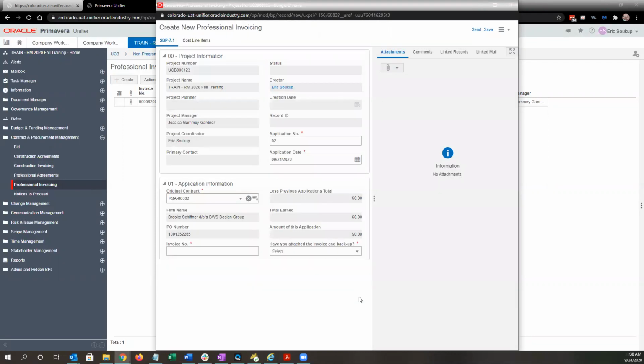One thing to note about the schedule of values being updated by all these business processes is it does lock it, and that is to prevent you from over invoicing against the scheduled value. And because of that, entry of invoicing has to be sequential.